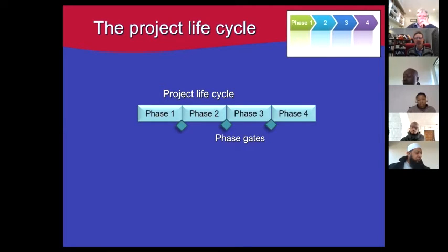Yes, very good. So both those things, so what you and Colin are both saying, you've got to meet all the requirements in that phase, but also you touched on something important there, Sibu, and that is that it could be that the project is cancelled or put on hold at a particular phase gate. And it's a very nice descriptive term. You come to this gate, you stand at the gate, and you wait for management approval for the gate to move into the next phase.